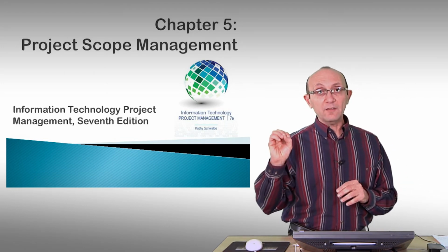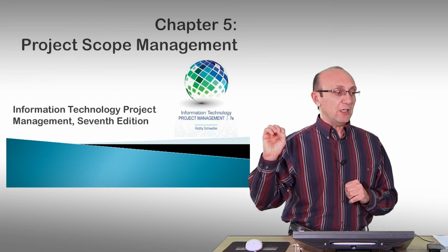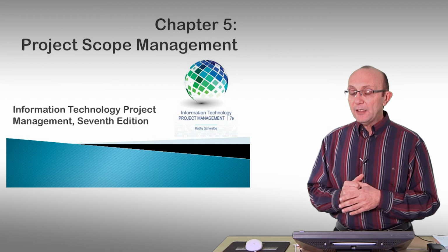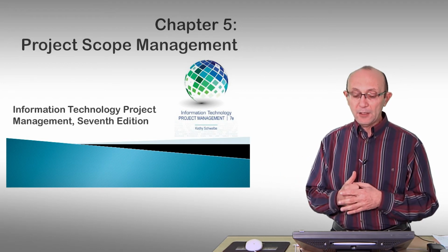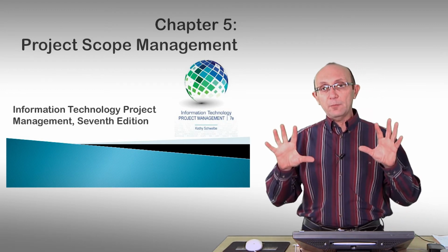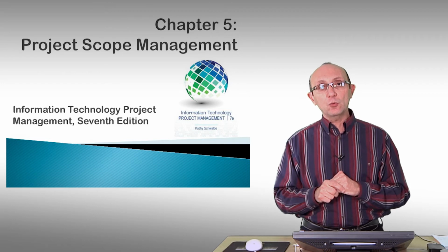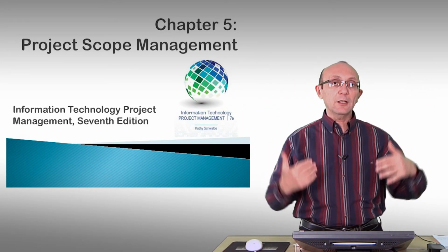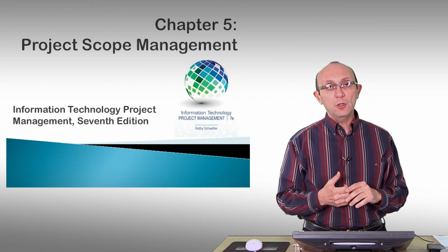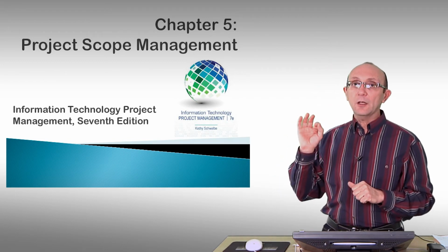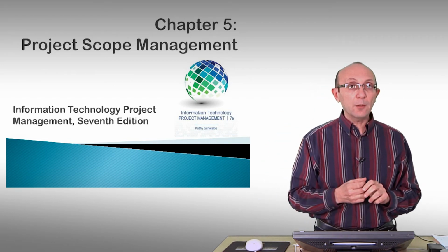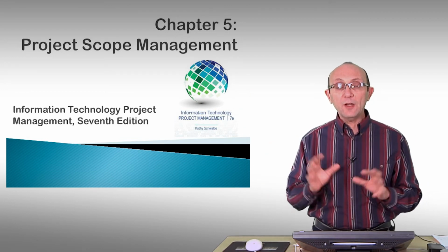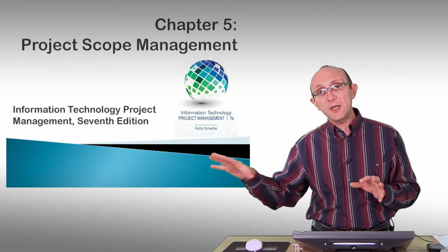The scope at this moment is highly creative. Don't expect to use any tools that will help you. However, there are different ways of defining the scope, as we will see in the book in more detail. There are building blocks on the scope that you want to pay attention to. These are basically the components of the scope. So the scope itself is high level, but you need to start elaborating into what we call the work breakdown structure. These are the actual building blocks, and these are the most critical parts of the scope. You can see the building blocks as the classes and the objects that make up your software. Once you get it right with the work breakdown structure, everything else should be transformational.